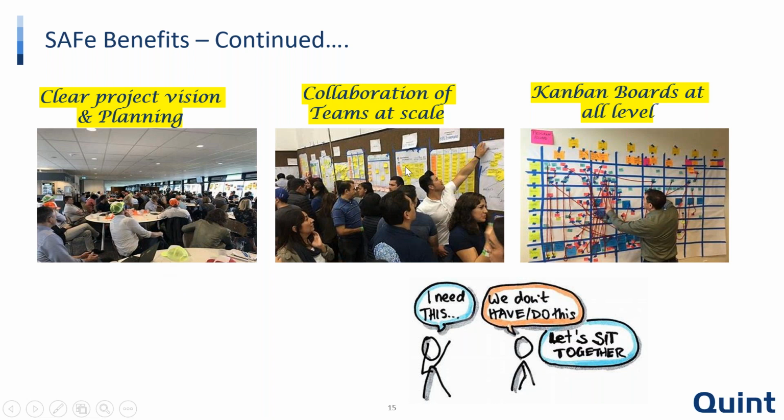And once they have clarity, they go back to their desk and start creating proper release plans for their particular Scrum teams. They're working together, breaking their features into user stories, and then connecting them with the various dependencies. And if they believe there are dependencies, this is where, if you see the third aspect, at a program